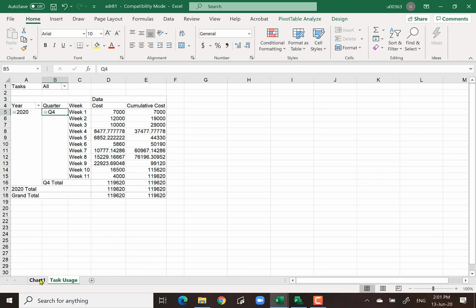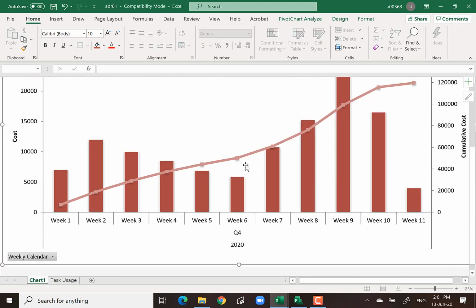And if you go back to chart, this is what your S-curve is all about. Based on weekly, you can change. Remember, you can change in the cash flow visual report in terms of days. If your project is very short, in terms of days, then you can get many more values. But I'm just choosing in terms of week. So you will know you will start the project 1st October and then finish 16th of December. This is an example of your S-curve.